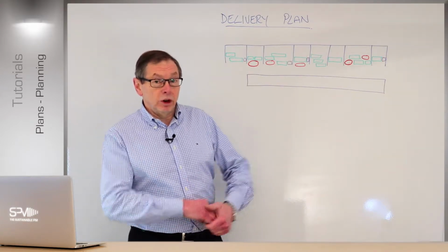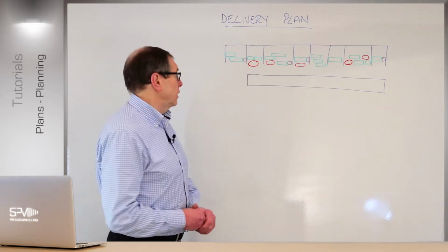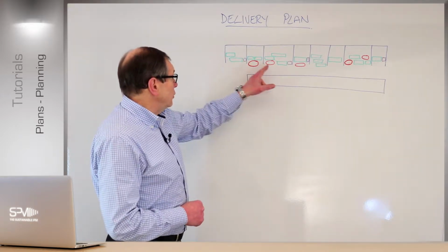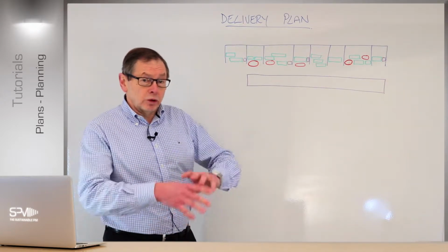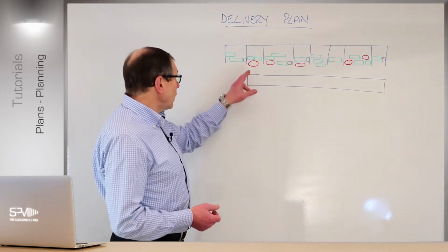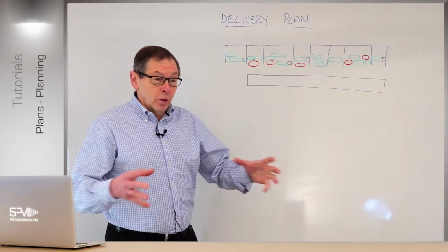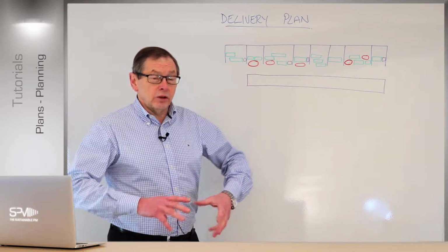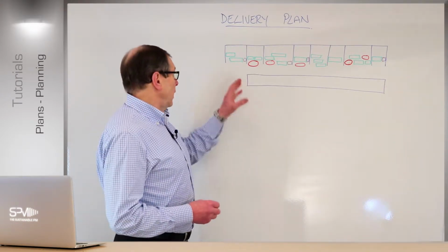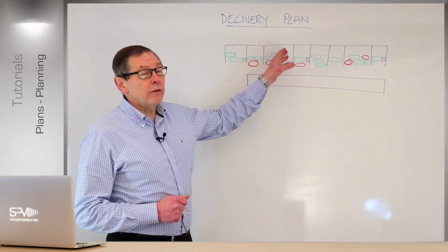Now we could, or at least we had to prove that we could this time. And that's one of the reasons why I have these decision points. So the green boxes here are looking at the time boxes we may have in place. We want to control the length of work. The orange ones are representing work packages, where the length of work might vary simply because we've got to complete the work. There's no two ways about it. And that's okay, because in the end, that particular increment's controlling that whole time frame if you want.